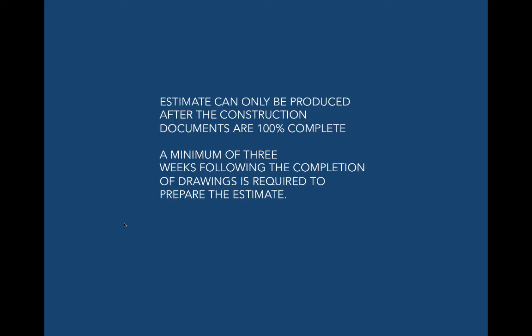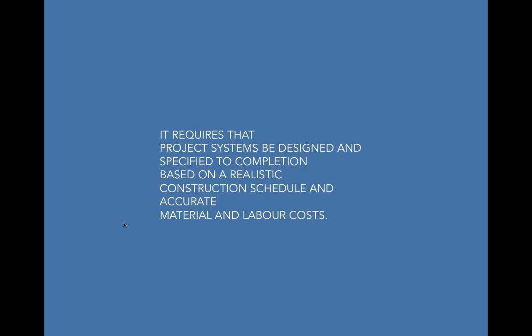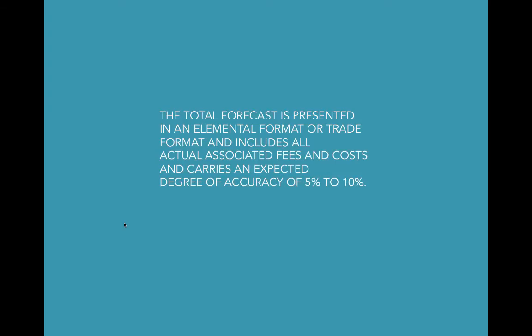One of the things that we discovered when we were caught on that 0% override, we had a cost estimate that was done as elemental. Everything was done in components. And when we tried to compare it to the contractors' bids, we couldn't compare them, because they weren't the same way of taking off and measuring a project. So it's very important towards the end of the job to align the costing process with how the builder is going to take off and quantify and cost their portion of the work. So this is the final estimate for tender.